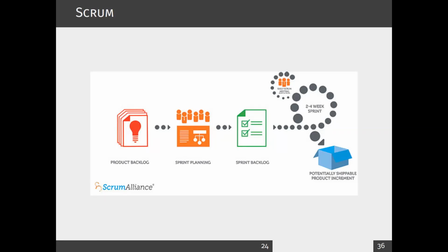The focus of Scrum is how the system works for changes, and we want to maintain productivity, especially the productivity of teams, and I will come to that point. Scrum usually works with teams, and you will have delivery life cycles which we call sprints, a term of 2 to 4 weeks. So iteratively they are going to develop.